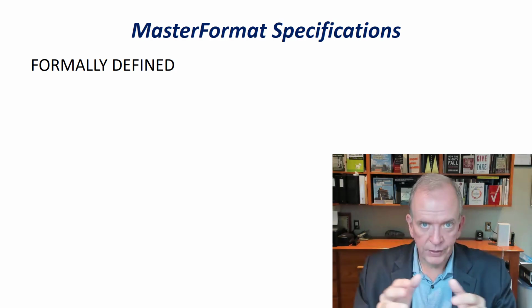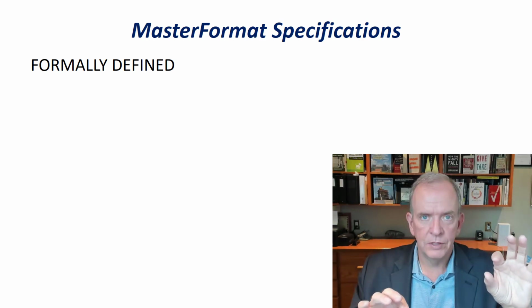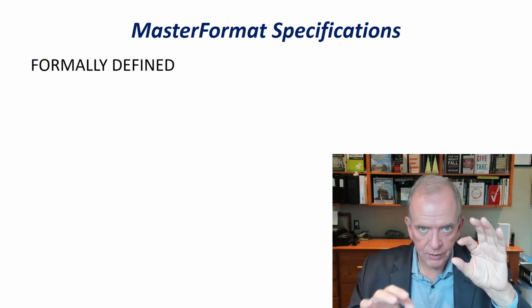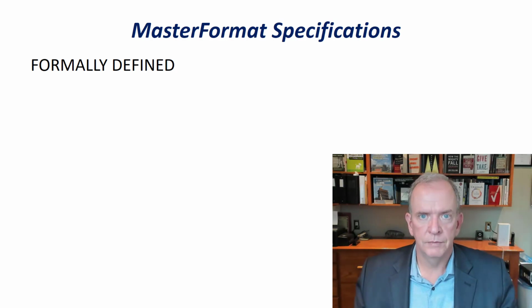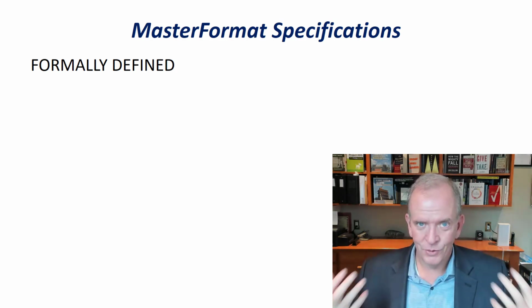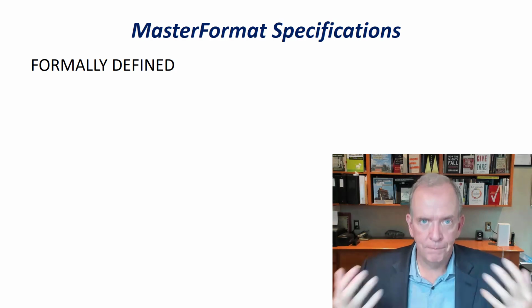And then even within the specification, if there's something at a high level of the specification, but then there's something at the detailed level of the specification, the detailed area supersedes the higher level, because now you're getting into very specific information. So there are these different levels of precedence. That's from a legal perspective. Ideally, when you see a conflict, you just want to get it clarified. You don't want to get down to I'm right and you're wrong. That's not good thinking. What you want to do is just avoid those issues, and if you see conflicts, get them clarified before they become big conflicts.